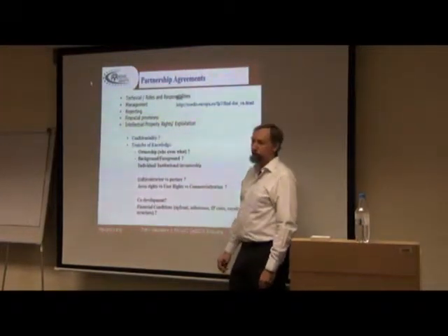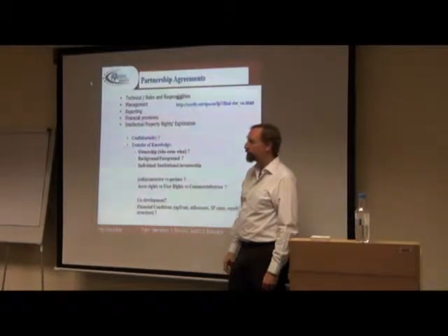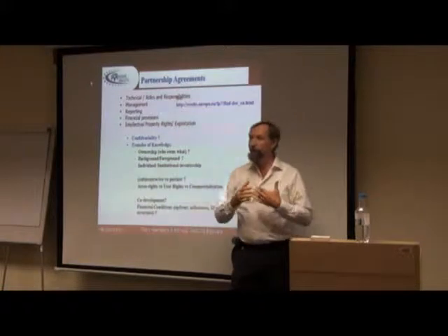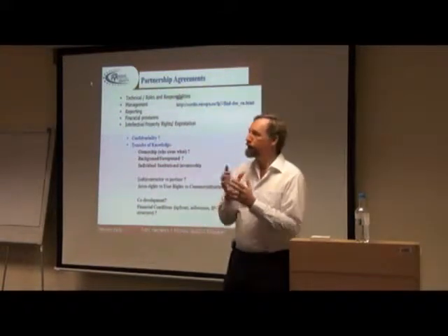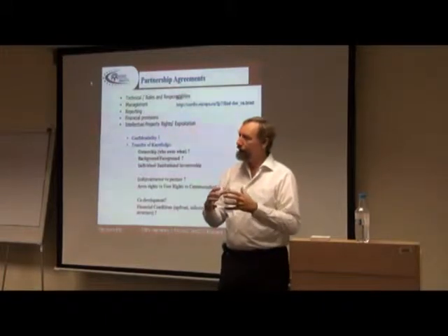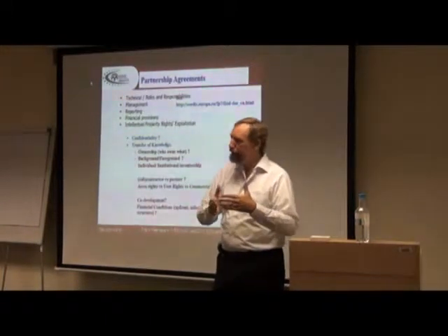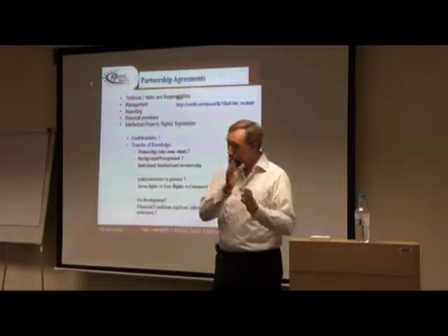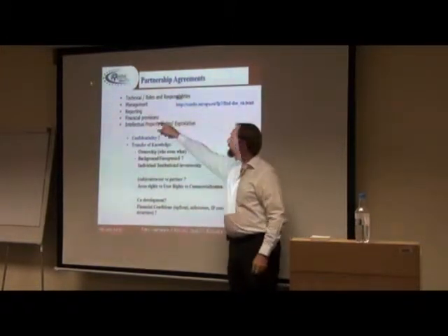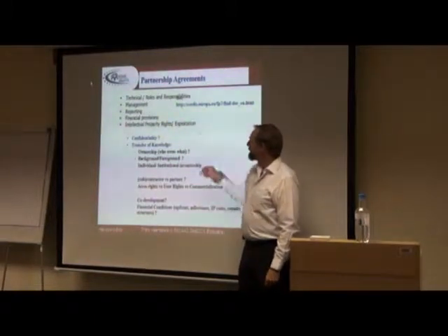If so, what are your responsibilities in the management of the project? How is the reporting organized inside the project? The European Commission may ask only once a year for a report, but the partners can agree to have an informal report every 6 months to keep track of progress more frequently. Financial provisions, of course, and the exploitation issues.